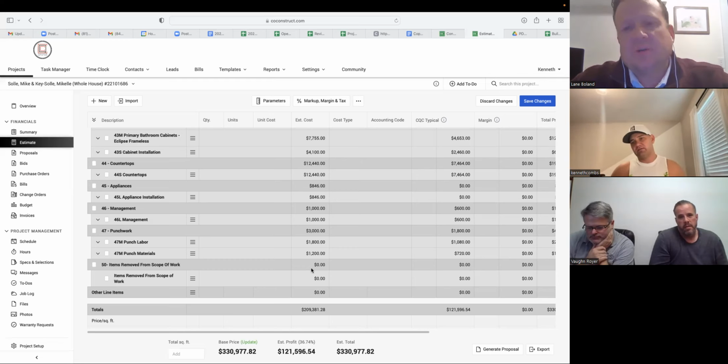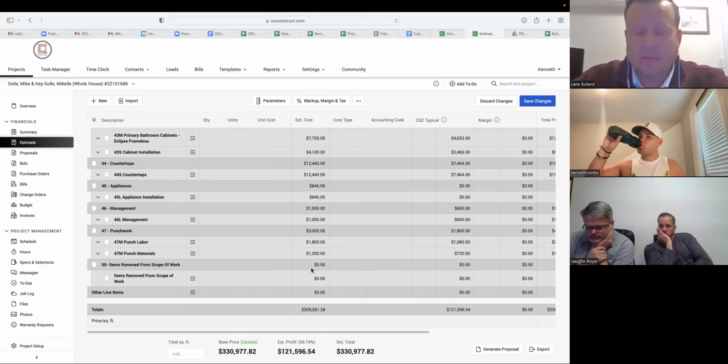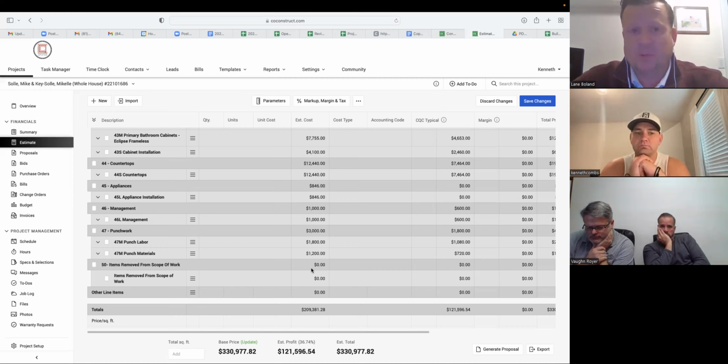Not necessarily. So when Ken's doing his 30% accurate representation of the client, this is before we sign the design agreement, and what he's communicating to them is based off of square footage. For example, our additions, we know historically cost between $275 and $400 a foot. Now it's edging more towards $450 a foot. So basically it's whatever the square footage is of what we think is the scope, multiplied by the multiplier. That's how we come up with the X and Y range.